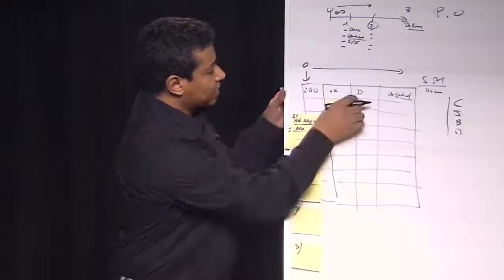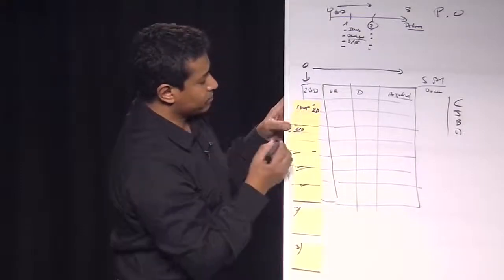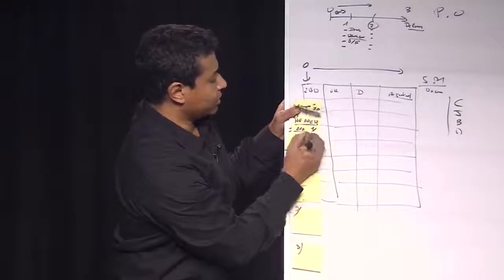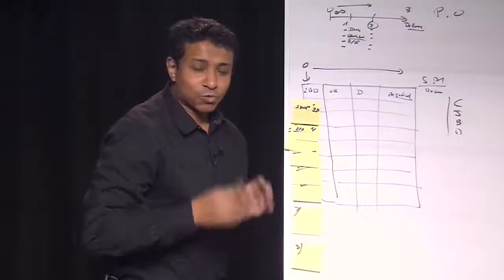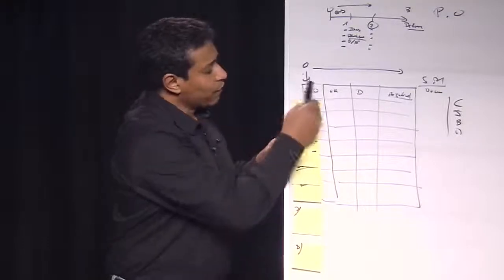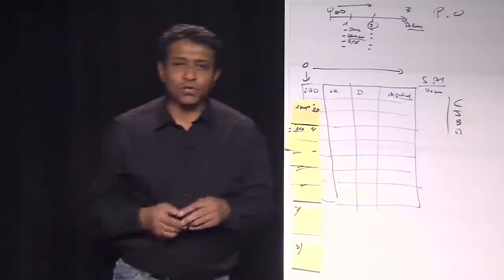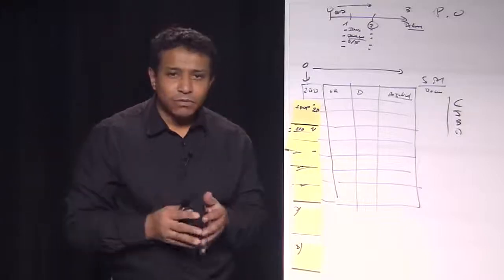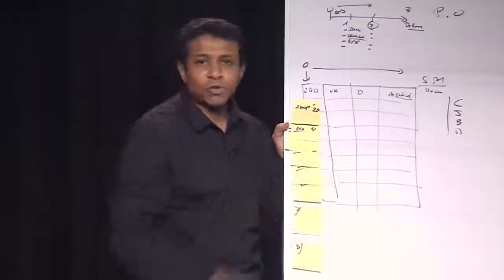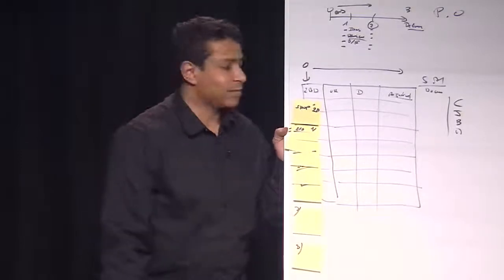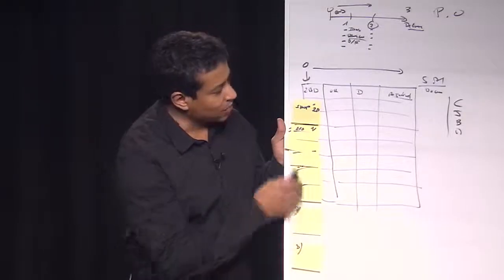So I've got to tell on my user story the duration. Here, 2 days. Okay? Here, 1 day, etc. Which means that the Scrum Master is really important there to fulfill the user story. This is a major role of the Scrum Master. Now that I know what I've got to do, I have to fill this array, which we call a Kanban board, so that my developers, my colleagues, know exactly how long it's going to last.